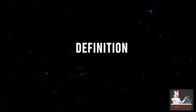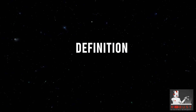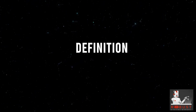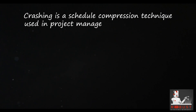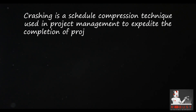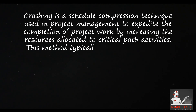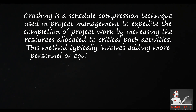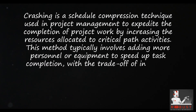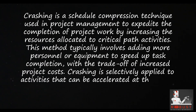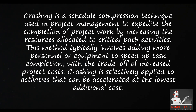Definition: Crashing is a schedule compression technique used in project management to expedite the completion of project work by increasing the resources allocated to critical path activities. This method typically involves adding more personnel or equipment to speed up task completion, with the trade-off of increased project costs. Crashing is selectively applied to activities that can be accelerated at the lowest additional cost.